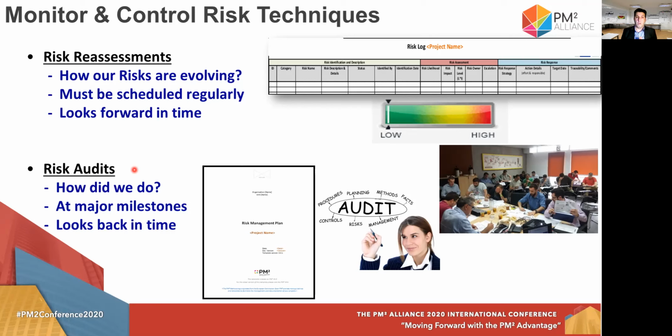And you know, it is very crucial to remember that the risk management plan will probably be updated after a risk audit. And the second thing to remember is that you are not trying to find the person who made the mistake, but to find out why the process was not good enough to prevent that person from making that mistake.